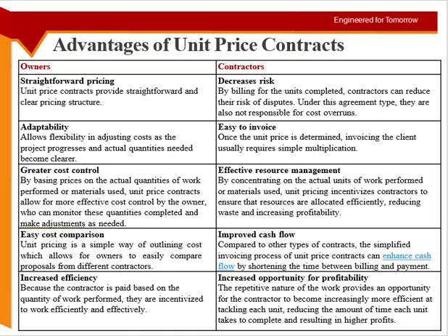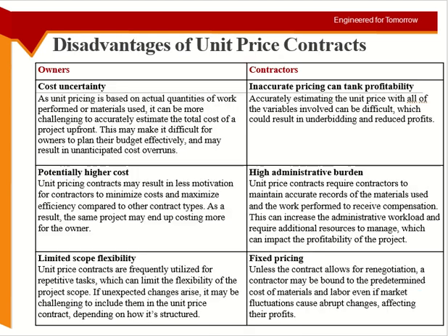Because the contractor is being paid on the basis of the number of units, if you finish this much amount of concreting, you will get this much amount of money. So what will he do as a contractor? You will try to finish it as soon as possible, so you can bill the client and get the money. So it goes in the favor of the client as well. Okay, and for the contractor, as we already mentioned, he can try to see how the work can be done more efficiently and how you can increase the profit margin in these things.